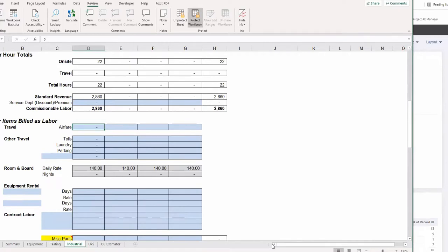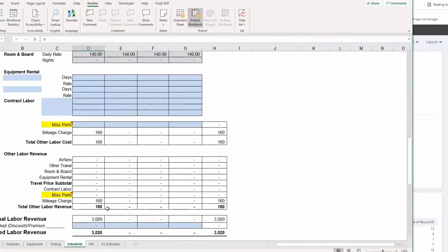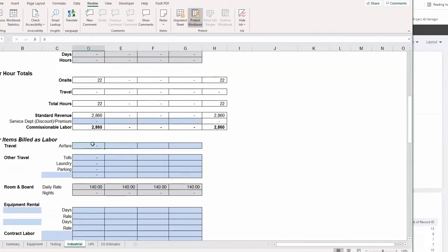If we were doing that, if we're going to New York, per se, right now, we would still fly someone there. There would be airfare. Any number you type in here, it's going to put a GM on it before it adds to the total down here. So be careful, that GM is somewhere around 30%, I think. So be careful not to overestimate here too much.